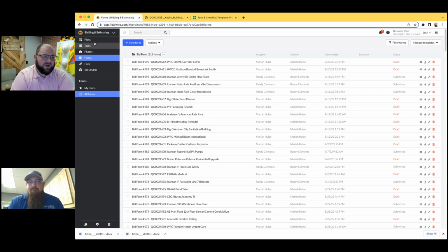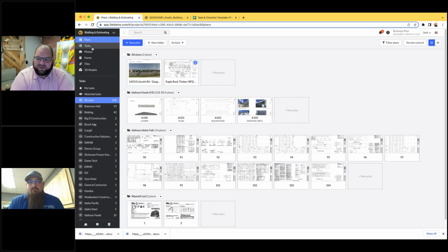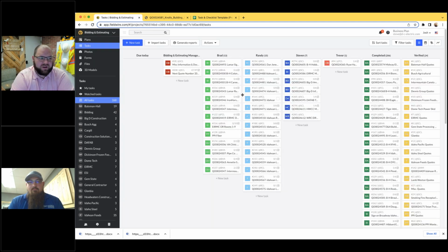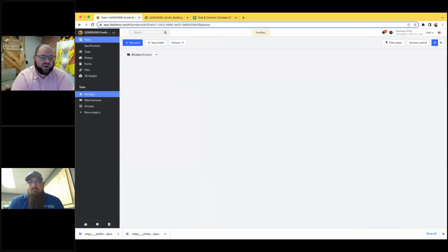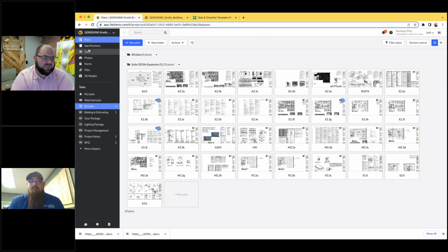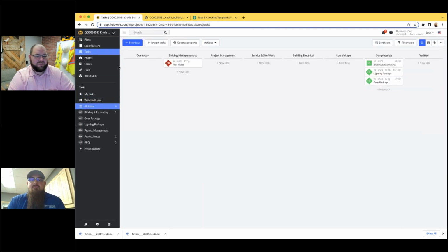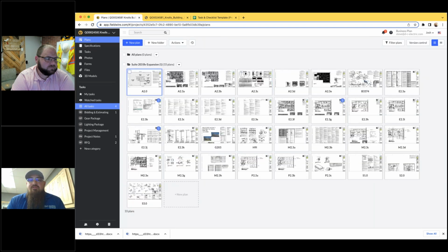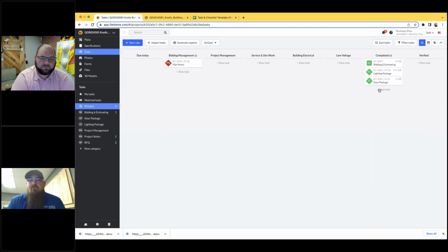Mm-hmm. And then one of the things, as he had mentioned, is taking this and creating a quote out of that project. So you have this project here, this quote number, and then what you're doing, and correct me if I'm wrong, but what you're doing is you're actually taking that and creating a project to do your RFQs out of, correct? Yep. So as soon as we get a quote number, we create a project in Fieldwire for that quote number, and get the plans in there right away, get our categories put together. And then the main thing that we're using this for is for RFQs, so a request for quote.